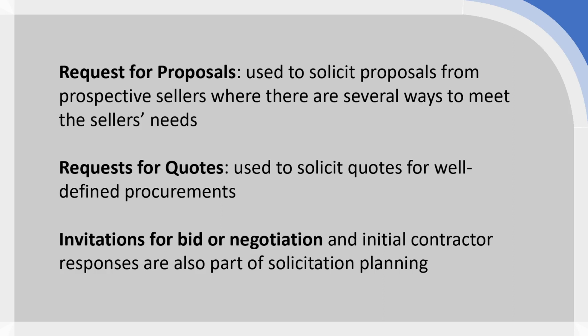as possible. So you would have a multi-tiered bid system or a set of formal negotiations over a lengthy period to make sure that as you are developing your documentation, as you're developing your understanding of what needs to be done, the suppliers are very much a part of that as well.